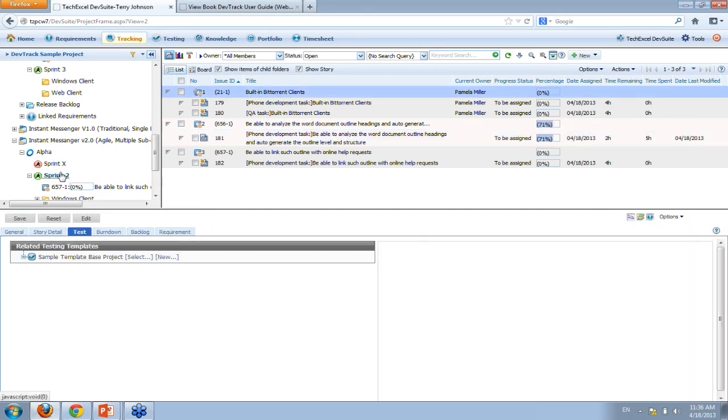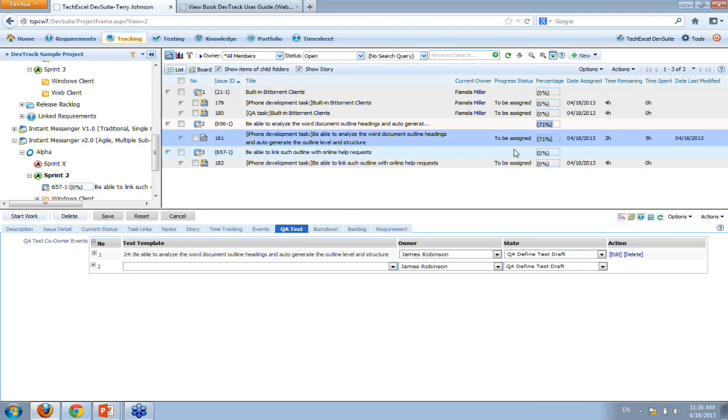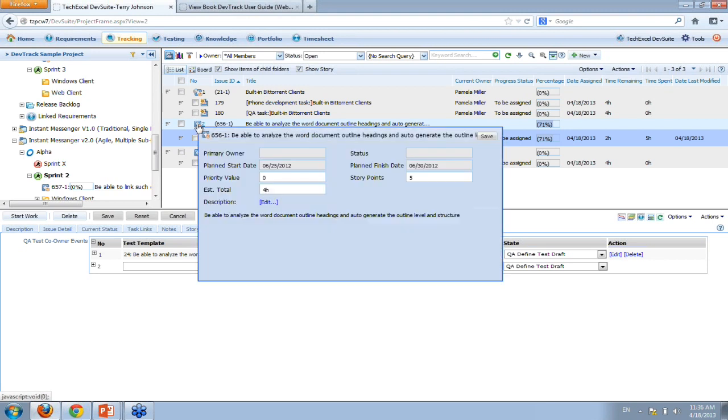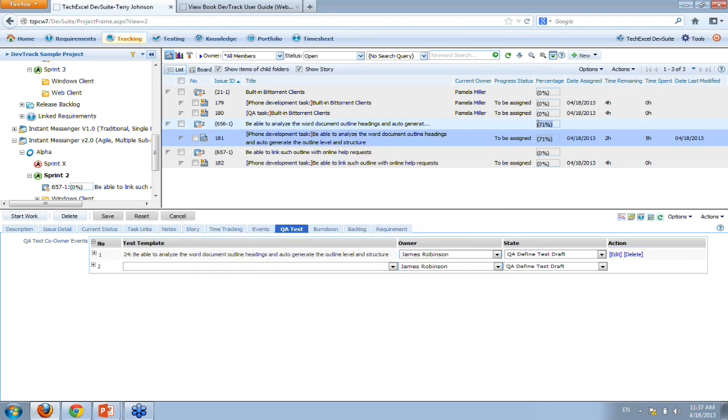So as you do this kind of updating of your development task, time spent, and time remain, as you notice, there's one field, percentage finish, that becomes a very simple field for you to drive. Not only can you drive the time remain, you can also see the percentage finish. If you have multiple development tasks, it will roll up to show you the requirement spec number 2, the percentage finish from the multiple development tasks.